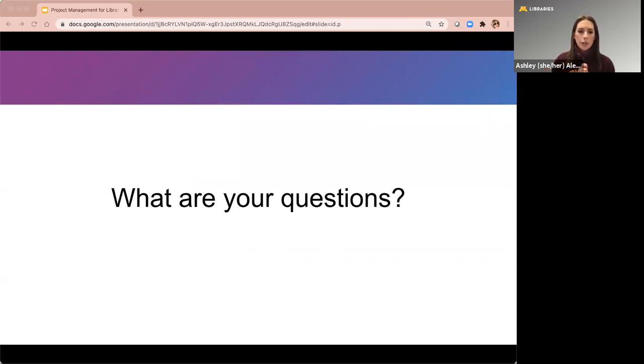As far as concluding from a documentation standpoint, often ending with a lessons learned, a retrospective is really valuable, because that's when you can talk about, okay, we thought this piece was going to take this long and it ended up taking way longer than we expected. So you can talk through and document that, and that helps future similar projects who might have that element come into play.